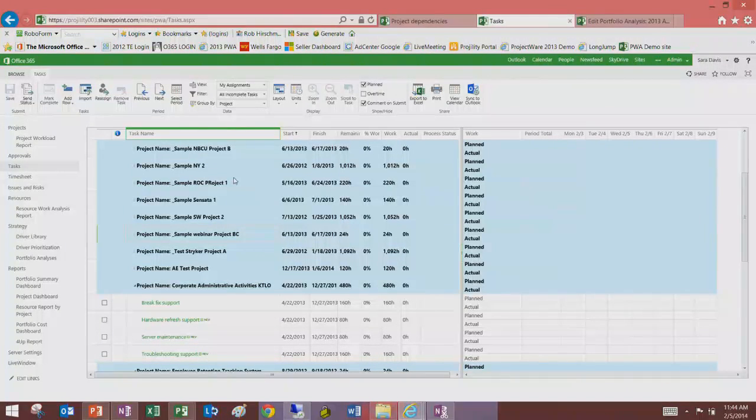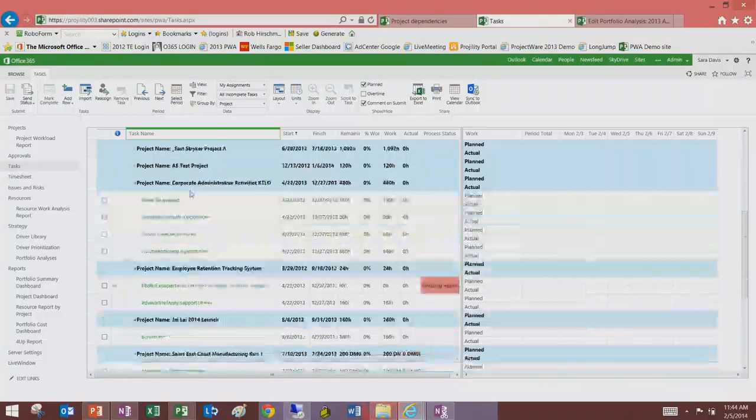You want to try to capture all the time. So if we go into my tasks or my timesheets, you'll see we have project work. We also have non-project activities. We want to try to capture keep the lights on, break, fix, things that take 40 or 50% of people's time, as well as things like vacation and sick and jury duty, so we get a full picture of what a resource is working on. We want to look at the full 40 and then start to break that down. What are people working on so we can do the analysis and share that with management. If we find people are spending more time on maintenance when they're really good at project work, we may want to shift them around and put lower dollar or lower value resources on that kind of work. So it'll give us the data to get the right information out.